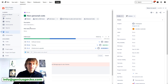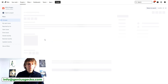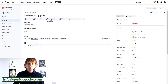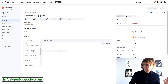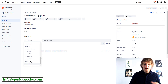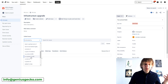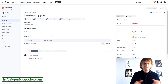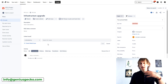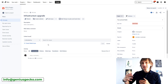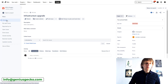Normally you could also create connections between JIRA issues using the JIRA link system — for example 'relates to,' 'is a child of,' 'is a parent of.' So you could theoretically create a hierarchy using links, but it shows here just as issues linked by a specific type of link. It doesn't have any special meaning in other parts of JIRA, which epic link does — and I'll be showing this to you in a moment. So use the epic link to connect an epic to its child issues and they create a proper hierarchy.